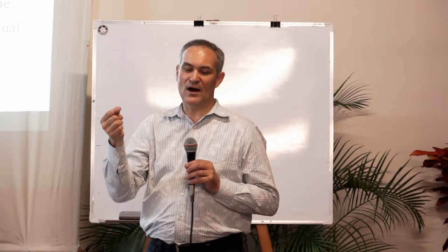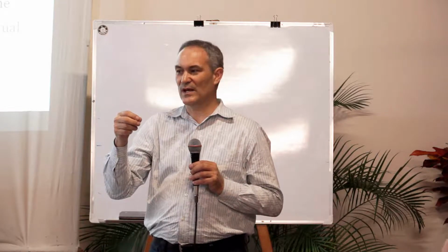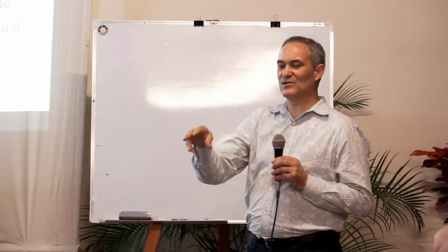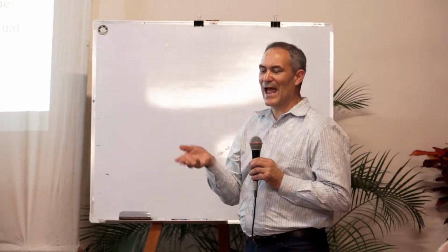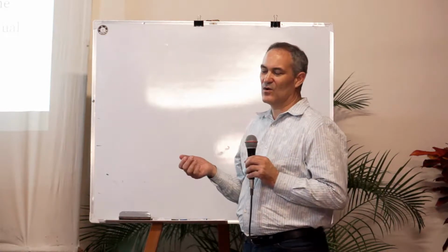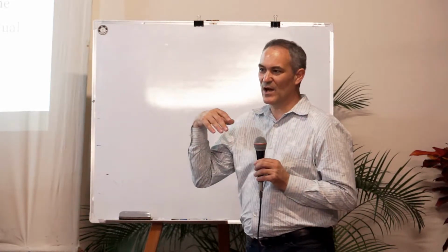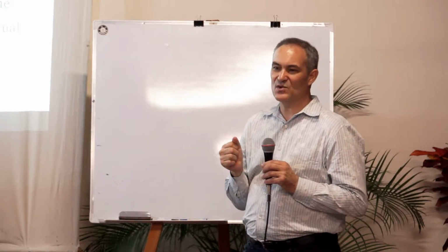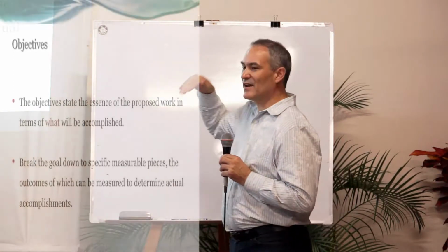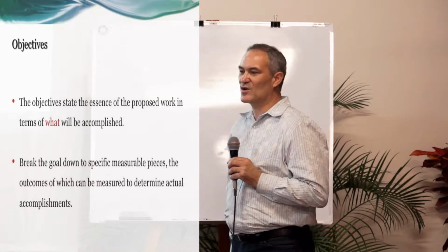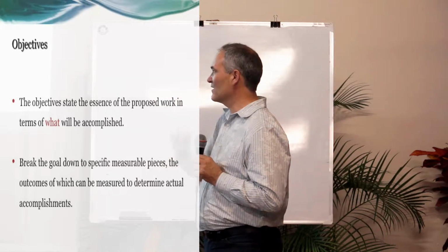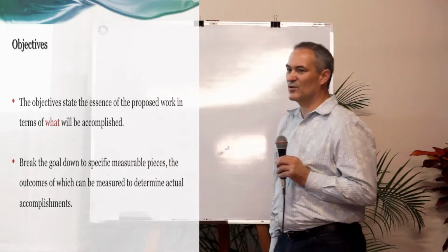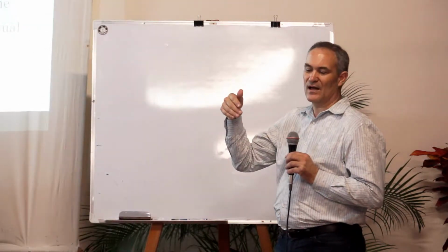Second, our new idea on how to do it better: how we're going to implement that, how we're going to get that into a school, how we're going to get internet connectivity to that school, and what we need to make that happen. And one of the goals of the project was local capacity building. How are we going to train the local partner, iSolutions, to be able to do this work? Those are objectives supporting that bigger overarching goal. We want to take that goal, break it down into those objectives, and make sure they're measurable so that we can track how the project's going.